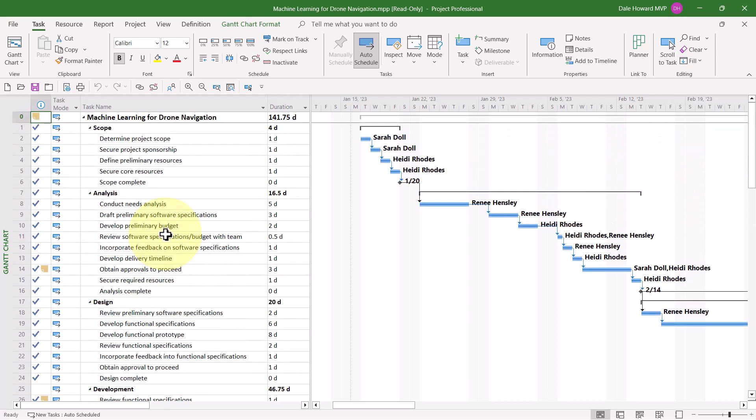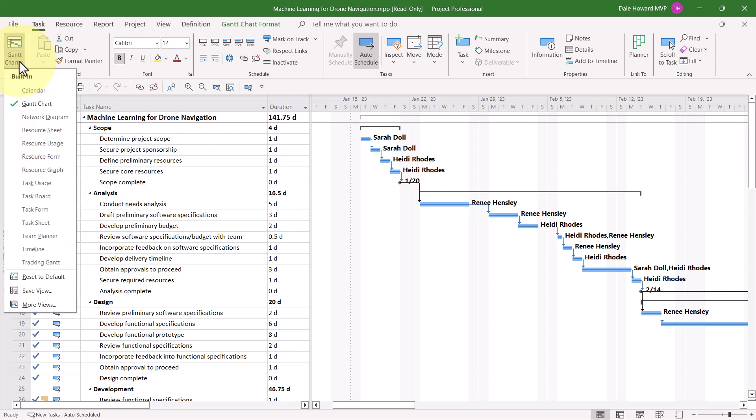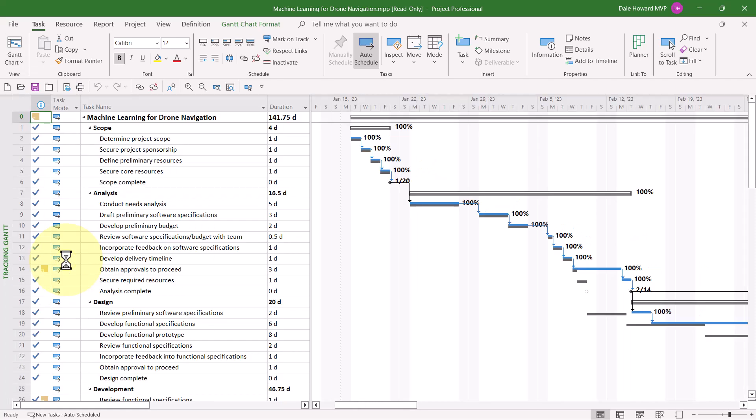If you want to analyze variance in your project, there's actually four locations where you can do this. The first one is known as the tracking Gantt view. To display the tracking Gantt view, click the Gantt chart pick list button in your task ribbon, and then choose Tracking Gantt on the menu.